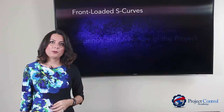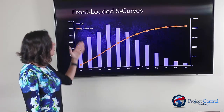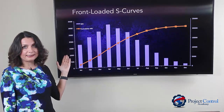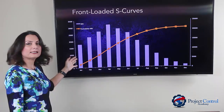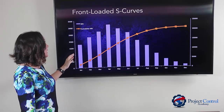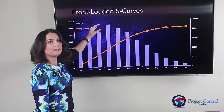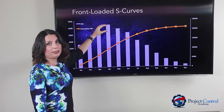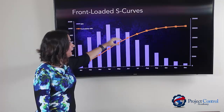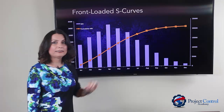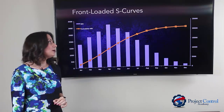One of the most popular ones you will see is front-loaded S-curves. As you can see in this graph, most resources are consumed early on in the project and then you ramp down very quickly toward the middle and end.